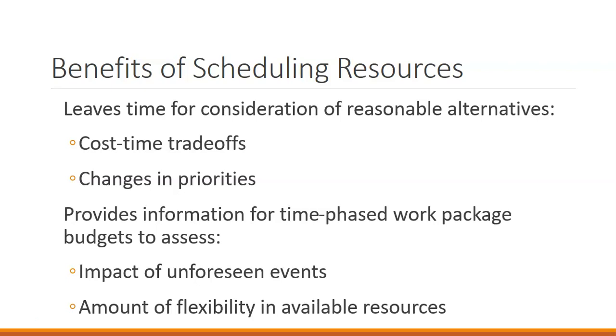Something that we might also have to look at is what the cost-time trade-offs are. So if we have a very time-constrained project, but we're also resource constrained, is there a possibility that we're willing to go over costs to add additional resources to meet that time constraint? Or are we more willing to go over the time constraint in an effort to reduce the amount of costs?